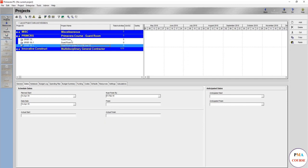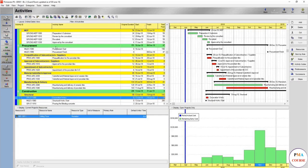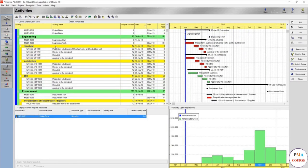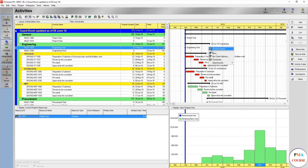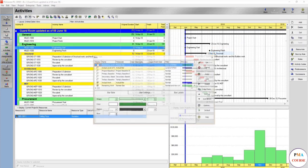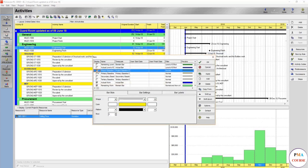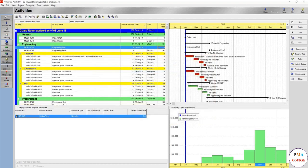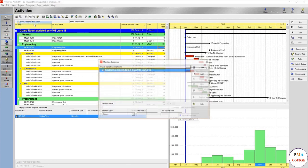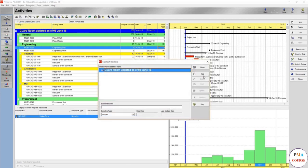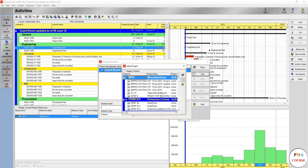So why did we take this copy? You're going to see right now. Open this one. The first step for the update is make sure that the project baseline appears. Always make sure to assign a baseline. To assign first you have to maintain. That's why we took the copy.